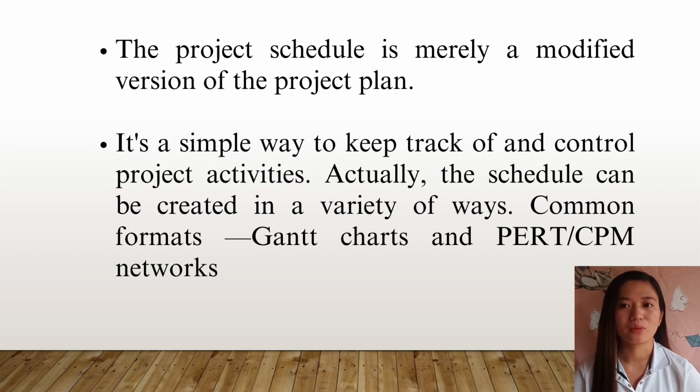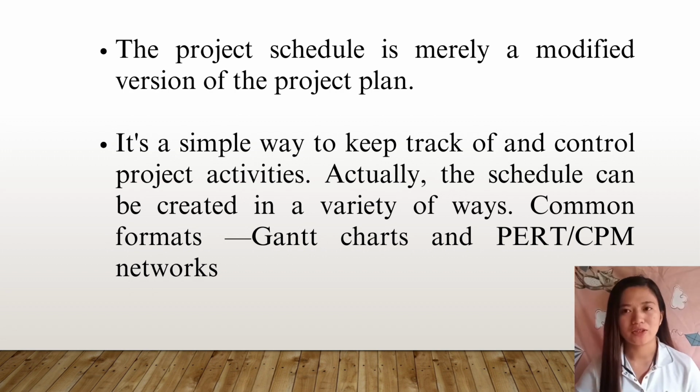Both break down projects into smaller tasks. Both help identify critical tasks that impact the overall project timeline. PERT focuses on time management, especially in situations with uncertain tasks and durations. CPM focuses on balancing time and cost. PERT uses a three-point estimate: optimistic, most likely, and pessimistic, to account for uncertainty. CPM uses a single most likely time estimate. PERT is better suited for projects with new technology or research and development.